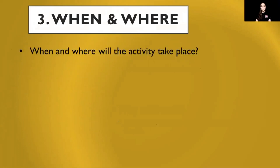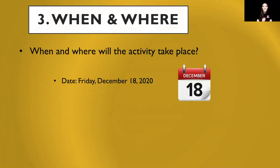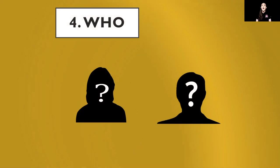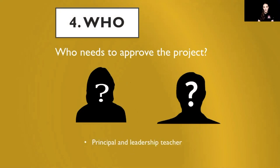W number three focuses on 'when and where' — when and where will this activity take place? For this example, Friday December 18th, 2020 is when this assembly takes place, with our time set to 1:30 PM. Our fourth W is 'who' — who needs to approve this project? This may be the principal or even your leadership teacher. It's important that you ask an adult on your campus to know who you need to ask for approval for your projects.